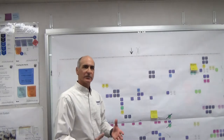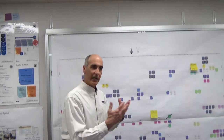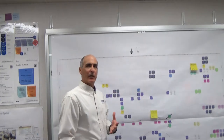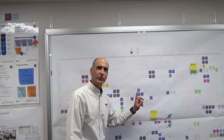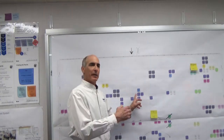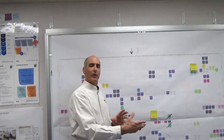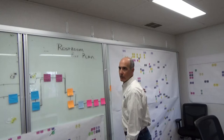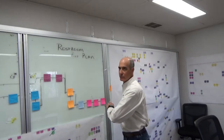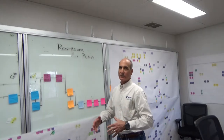So in the foreman's meeting, it's not us telling them what they're going to do this day and that day. It's us keeping them in check with each other that they're making reliable commitments. Because at the end of the day, we're not pouring concrete. We're not building walls. They are. So they're making reliable promises that I will build this wall on Tuesday. Mr. Electrician, you can get in on Wednesday. By them making the promises to each other, it's a more reliable commitment.